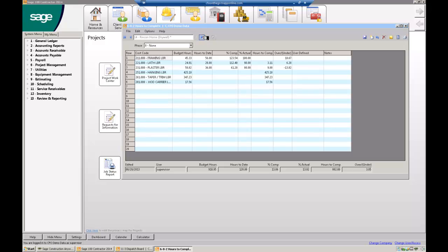As we put an estimate together, and this could be your cost codes, your items of work: remove roofing, remove sheeting, install sheeting, install paper, install shingles, whatever. These are the tasks that you have to do on the job. This is the hours that somebody thought it was going to take to do. These are the hours that have been processed through payroll.